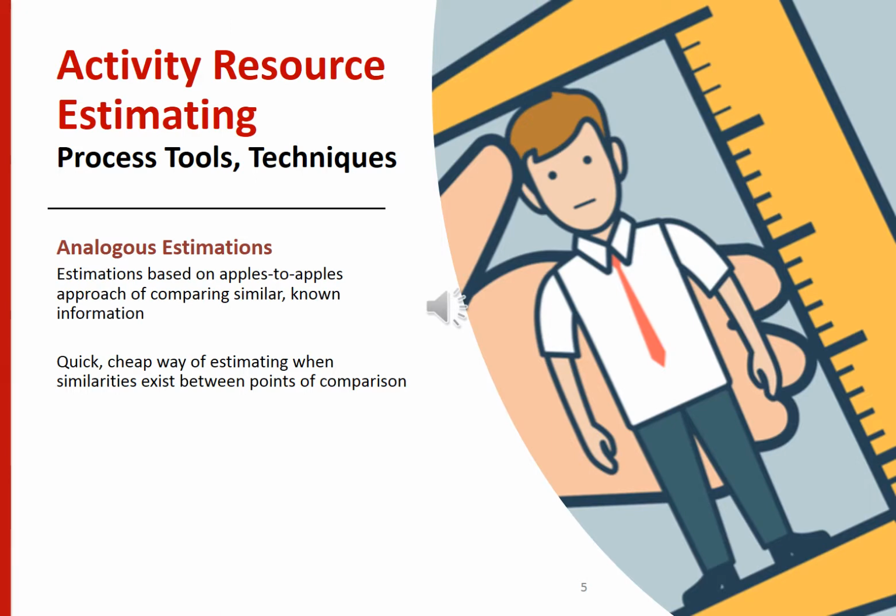Analogous estimating is a great tool when the current project you're working on has very limited information or has no actual cost data. Without enough information to accurately decide the time frame or cost, it's important to find ways to gather this information. For example, if you're creating a video for a customer and decide to use analogous estimating, you would look for past videos that are similar.